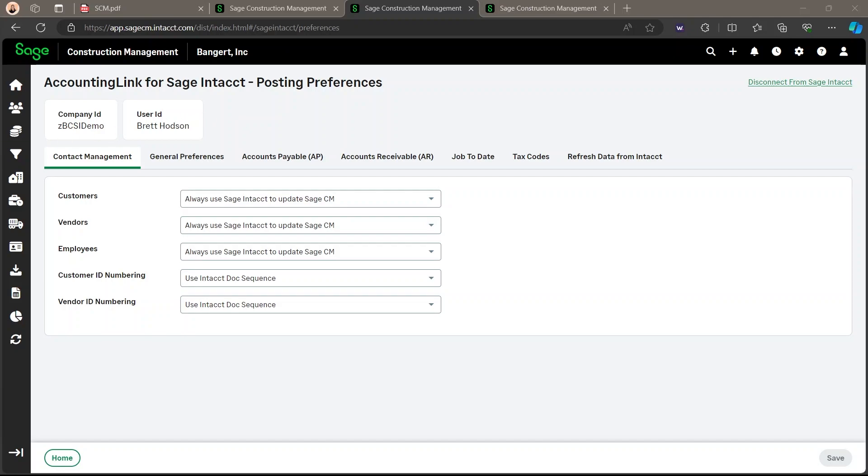Now when sending a project, the begin date to Sage Intacct, the earliest date available is selected and Intacct expects the project contract date to be after the project begin date, which is considered as the date that the project has been added into Intacct.